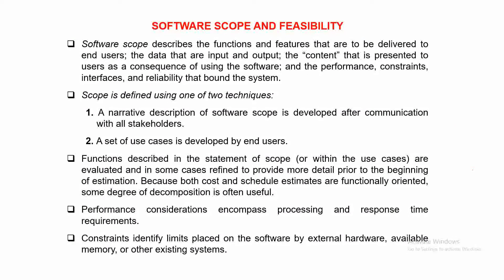The scope is defined using one of two techniques. First, a narrative description — after communication with all the stakeholders. Point-wise narrative description: like in a banking example, credit should happen, debit should happen, and so on. A narrative description of scope covers all the things we need to include in the software.